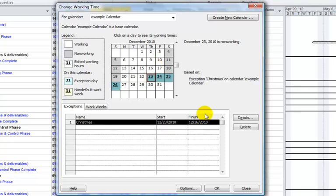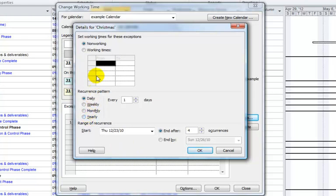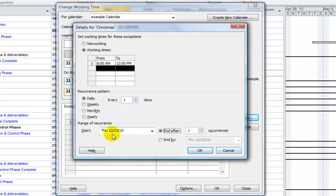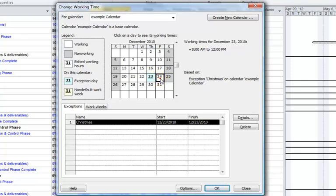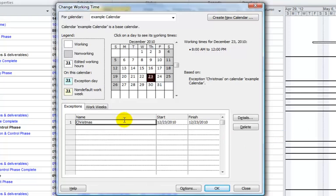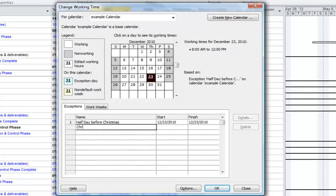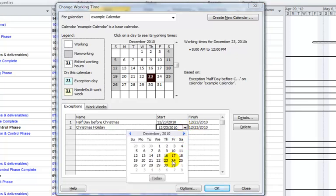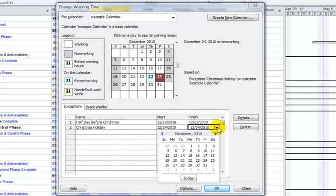However, what if on the 23rd it's actually a half day? We can go to Details and set working time to be 8 to noon. Select a row, hit the Delete key, and delete that content — it ends after one occurrence, starting on the 23rd. Click OK. Then we'll add an additional exception — maybe we'll call this 'Half Day Before Christmas,' and then set 'Christmas Holiday' for December 24th through the 26th.